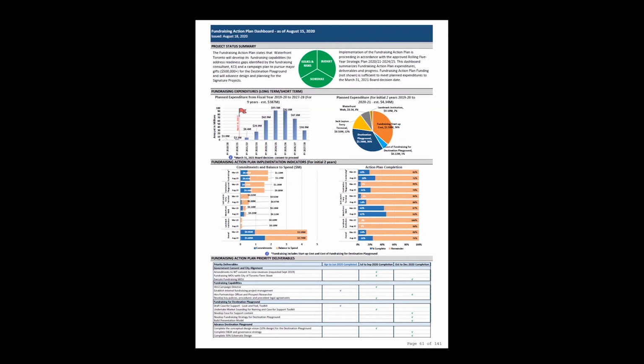Thanks for the question, Patrick. In terms of the philanthropic cash flows, we're not showing any fundraising related revenues in those cash flows because it's too uncertain at this time. Likewise, the expenditure that would match those inflows has not been shown. The only cash flows reflected are about $4 million, or less now, that we had originally included in our corporate plan for the 15 months from January 1st, 2020 to March 31st, 2021 to implement this fundraising action plan. We had already secured funding for that through some of our own revenues, so that's the only part reflected in the cash flow at this time. Appreciate the prudence. Thank you.